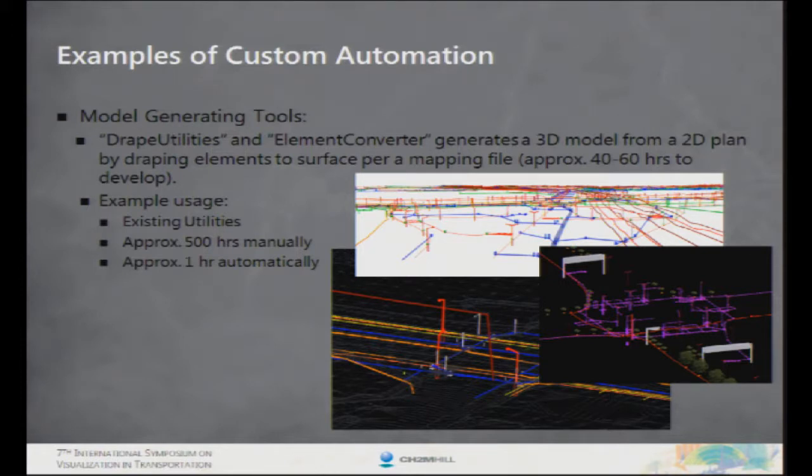The first time this was done, it took about 500 hours manually to handle the tens of thousands of utilities, and even then, I'll be the first to admit that the product from these existing utility as-builts, as Philip can attest, was a far cry from the accuracy desired. Nonetheless, there is value in having an approximation of a 3D utility file when it comes to doing clash detection and identifying the high potential for risk.